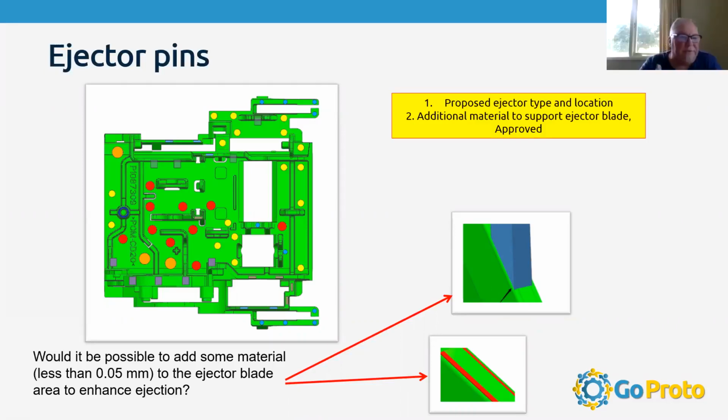You mean back and forth during the DFM? Yeah. This is a possible lead time eater, and I just want to address that a little bit here. Well, typically the DFM is done on release. Once the project's released, the shop will sit down and do the DFM. I present it typically the next day within 24 hours, and we get that to the client. Client reviews it. We have a review over the phone.